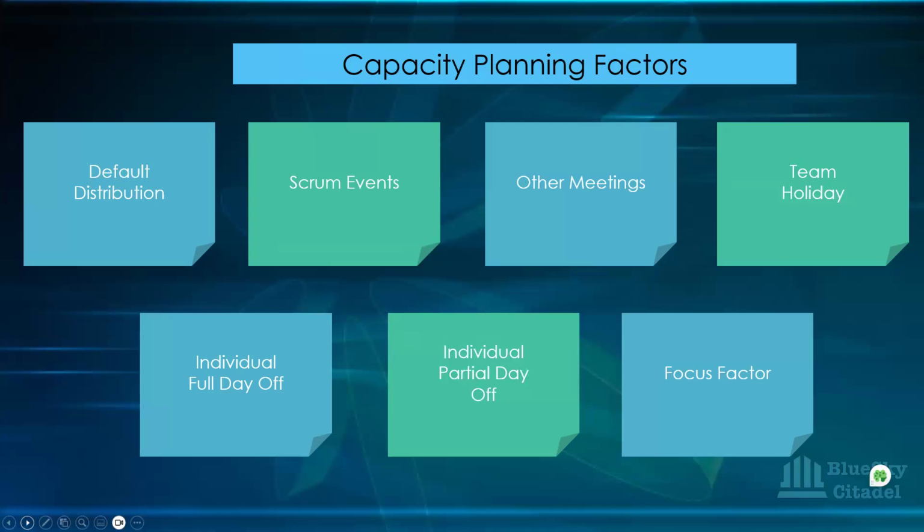And then you're doing 7 hours or thereabout for 10 days. That is maybe 70 hours that you're doing. So that is your default distribution. Okay, it doesn't change. That is what you've been employed to do. That's the normal time you've been employed to do in the organization.